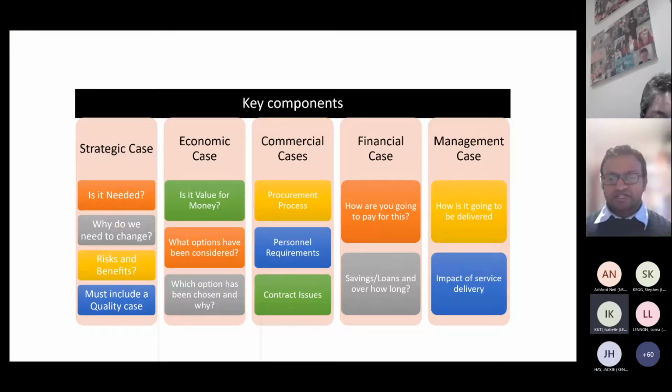So if you're looking to staff a clinic every week of the year, then you're looking at roughly 1.2 full-time equivalents when you're looking at your funding.